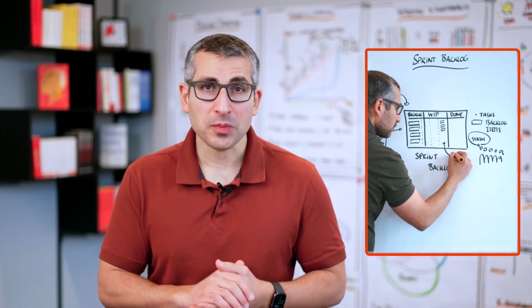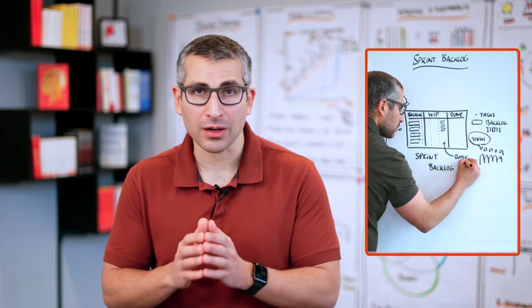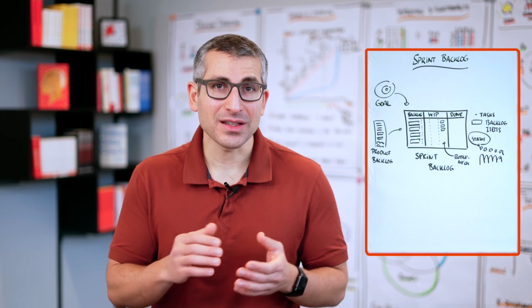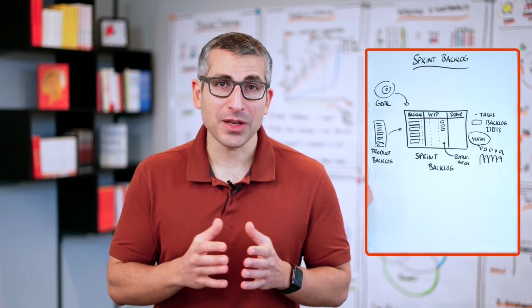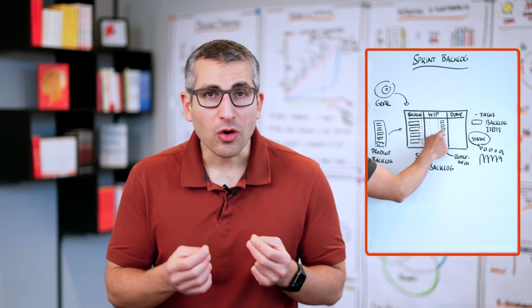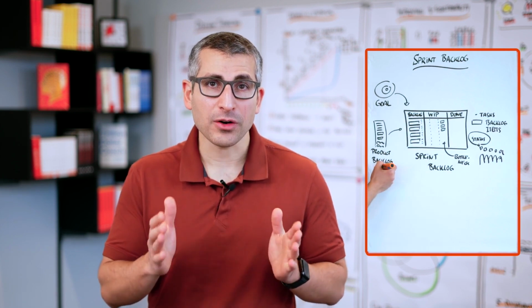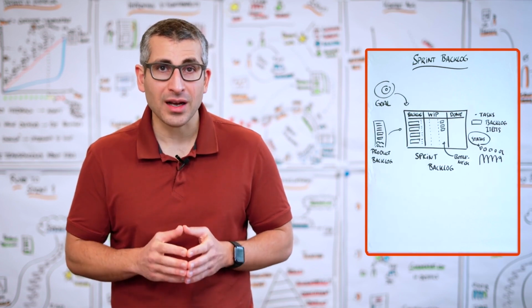Ideally, at the end of a sprint, all items have been moved from backlog to done. But that doesn't happen always. As we know, life is not ideal. So what do we do with the items that have not been finished? Before we go into the next sprint, we always try to clean up our sprint backlog. My recommendation is to start on the right-hand side.